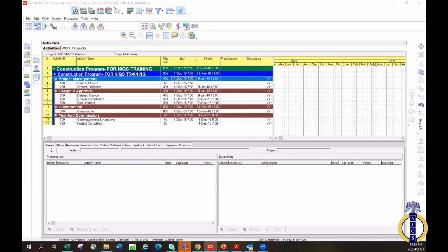You have to finish with your excavation, you level and compact, you blind first, before you now put your starter bars and column basket in there. So they have a finish to start relationship.